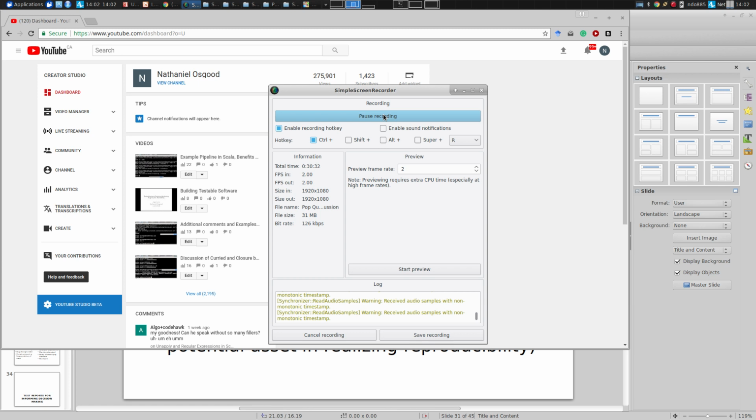The statement of the requirement may hold ambiguities. It may hold conflict between the visions of different stakeholders. It may hold a lack of consistency, and you can find those things in peer reviews. Just like you can peer review many types of things we talked about earlier: requirements documents, test plans, design documents, and architectural documents, etc. These are things that we can't directly test. Now, does that mean we should be doing peer review instead of testing?